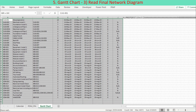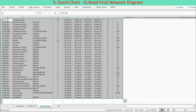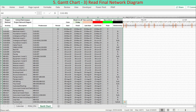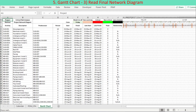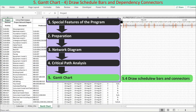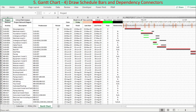Secondly, activity schedule details are read from inside the activity node boxes, and dependency relationships are read from connectors depicted in the network diagram. Activities are populated and ordered in sequence as presented in the network diagram rather than in the sequence of the activity data table. Lastly, schedule bars and connectors are drawn. Early schedule is displayed, with critical activities differentiated from non-critical activities by different colors. Dependency relationships are presented with connectors. Late schedule is displayed without differentiation between critical and non-critical activities, and without showing dependency relationships, to avoid congestion.